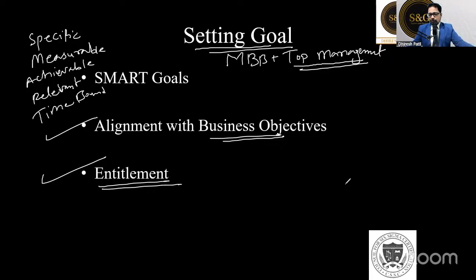Very good, very good. Superb. 1 year, right? 1 year data. Why 1 year? What is the objective of 1 year? Because in 1 year, all the permutations, combinations, seasonal trends and patterns can be identified. So you select at least 1 year data. You collect at least 1 year data.